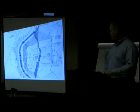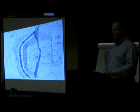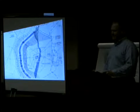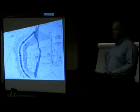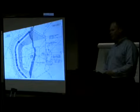Finally, and it was a late bottom of the ninth inning addition, we are going to put temporary seeding and actually temporary spray mulch via hydro seeding over the entire disturbed area during the interim shutdown period. It was going to be compacted gravel. We didn't know if that extra step was necessary, but in speaking with the peer review team, it became evident that it was something that was going to improve water quality. Pretty short money on our end, so we added it in there. So this whole sheet 301A is an important erosion control and stormwater management step that was really not a part of the original notice of intent filing and was a result of the third party coordination.